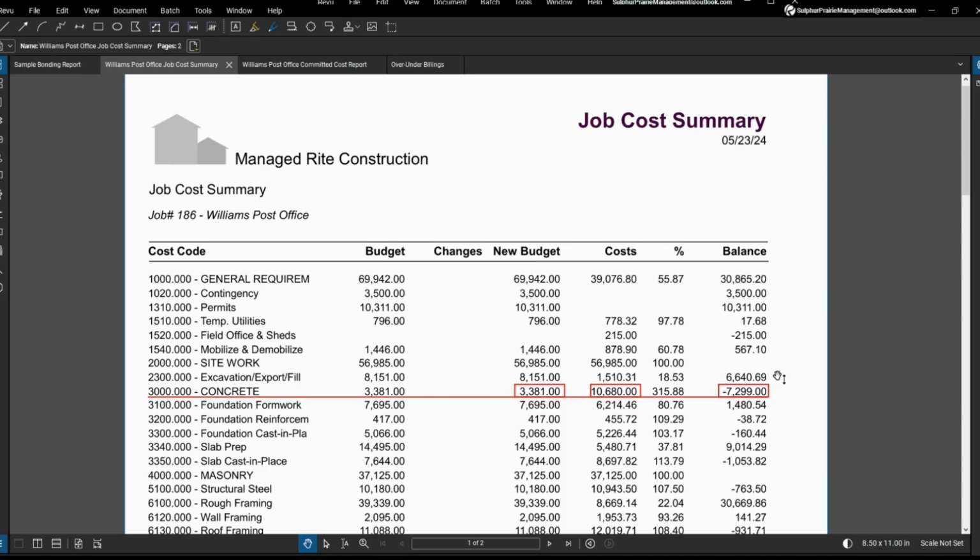This example is of a general contractor, but since labor efficiency is the real issue in construction, it's even more powerful for a subcontractor to track estimated hours against actual hours by phase. There's a spot for permits, concrete, rough framing, and any other task we need to track. As a subcontractor, you can track as granular as you want. My clients track labor for projects by 4 to 8 week long activities like phase A rough-in, floor 2 trim, or duct bank A to B, for example.